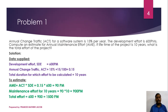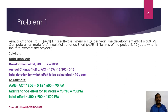Let's see a problem related to Boehm's model. The annual change traffic for a software system is 15% per year. The development effort is 600 person months. Compute an estimate for the annual maintenance effort. If the lifetime of the project is 10 years, what is the total effort required for the project?